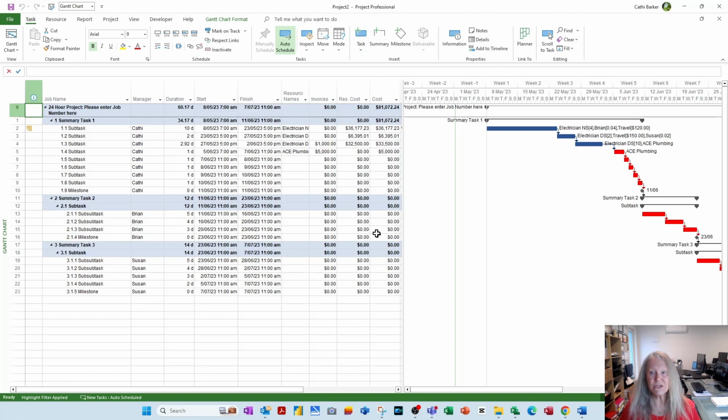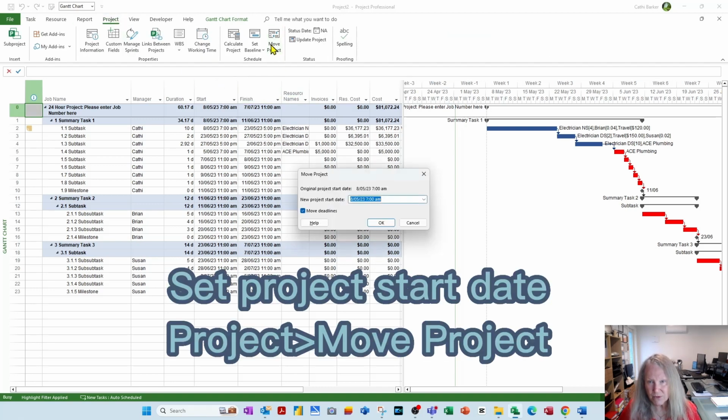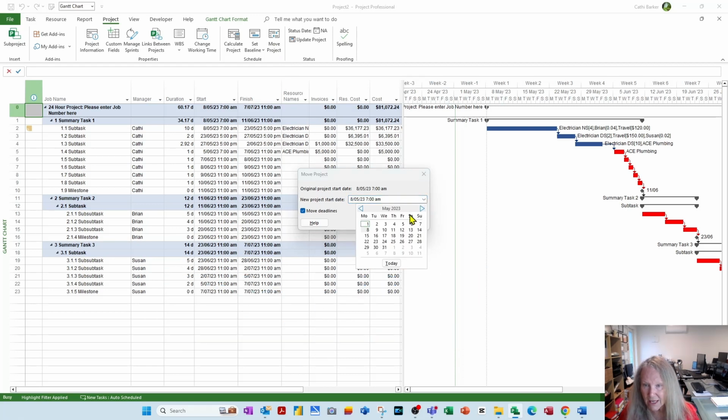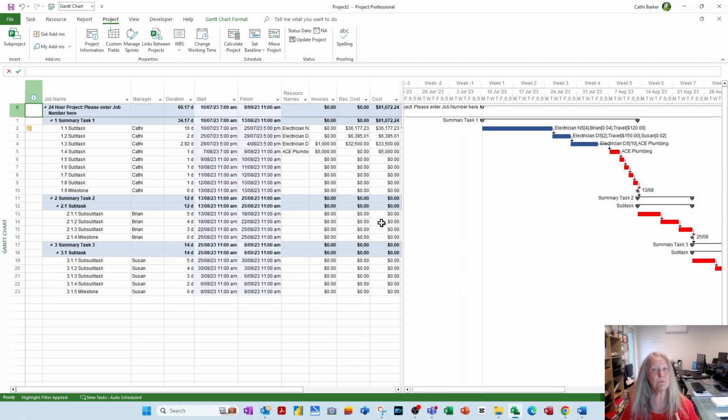So now all I do is say, right, well, this project is going to start 2 months from now. So I go into Project in the ribbon and I move the project 2 months from now. And I say, right, this is going to start on the 8th of July. And I choose the 8th of July. Let's make it a Monday, so the 10th of July. And okay. And it literally picks up the project and moves it to the 10th of July.